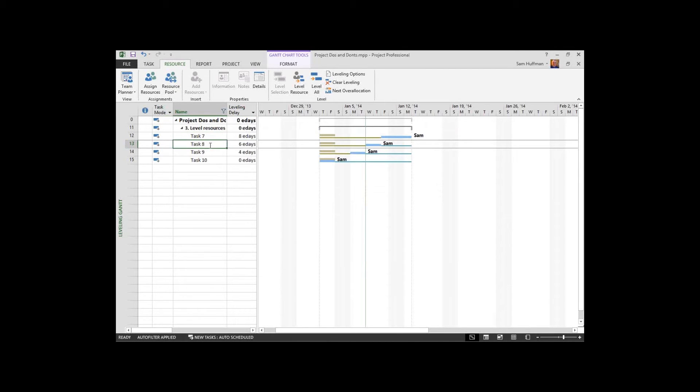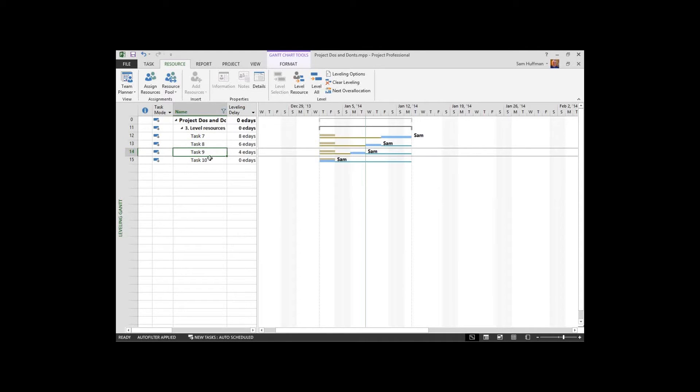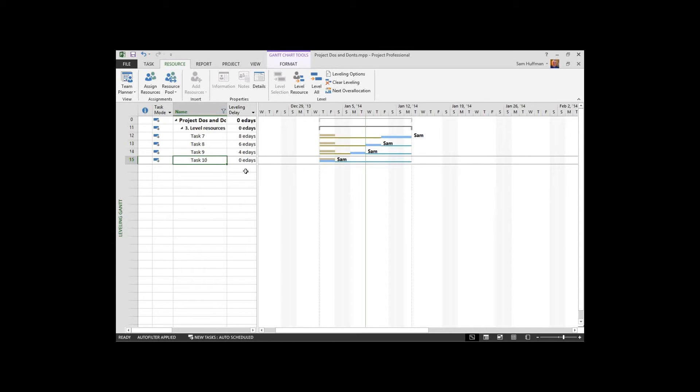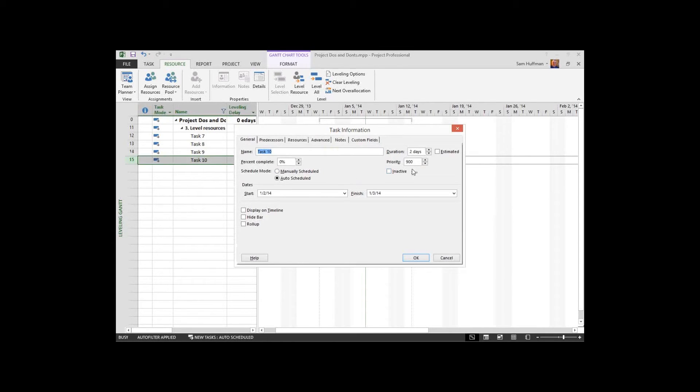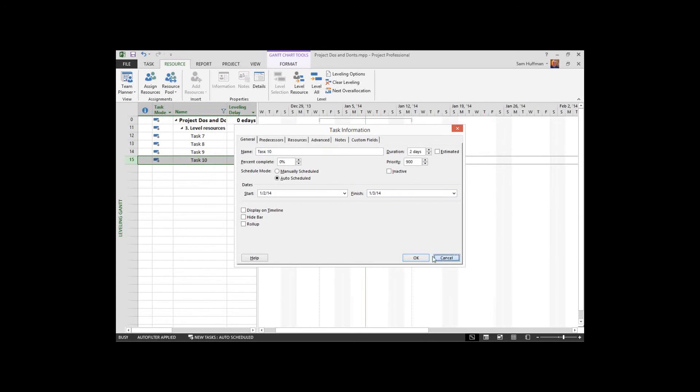It's because I chose increasing levels of priority for each task. So task 7 was 600, task 8 was 700, task 9 was 800 or 900, and then last, the highest priority was task 10. Task 10's priority of 900 was essentially do not level project, leave this task in place. So you can prioritize, but in project, prioritization is used in leveling the tasks themselves.